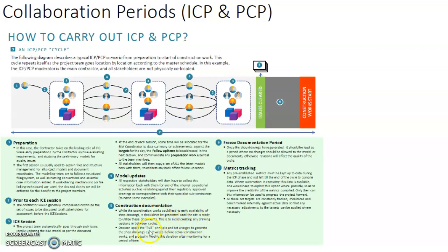One can apply the pull principle and set a target to generate the shop drawings, for example, 2 weeks before the actual construction work, and gradually modify this duration after monitoring for a period of time.